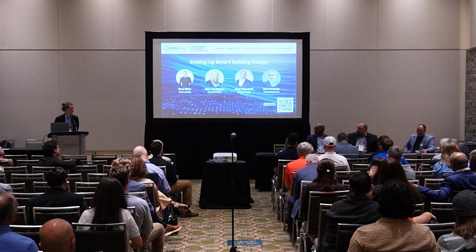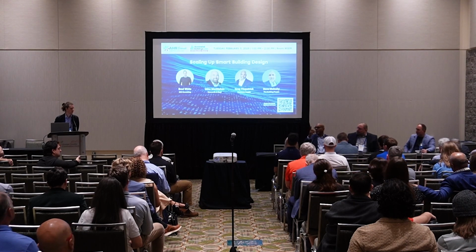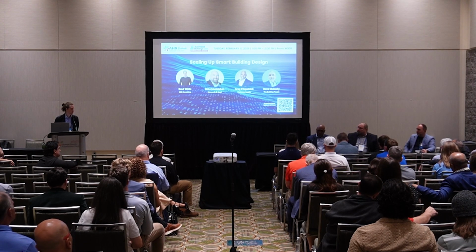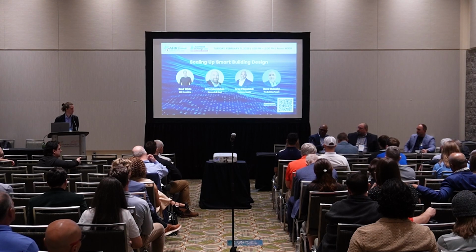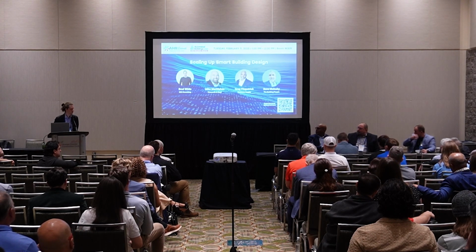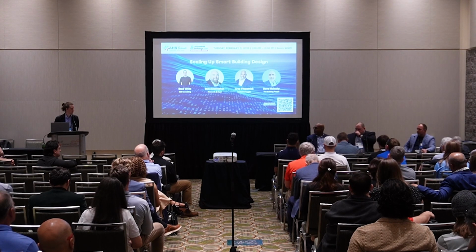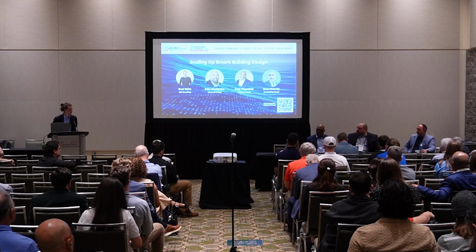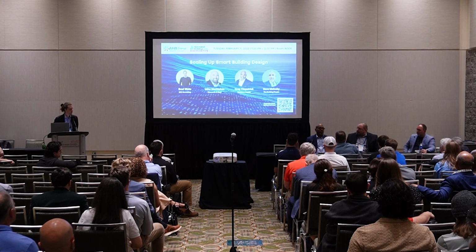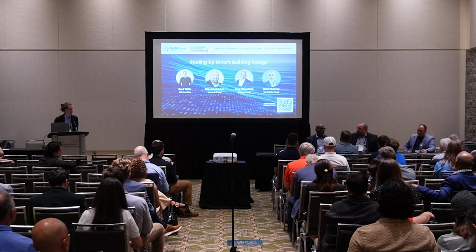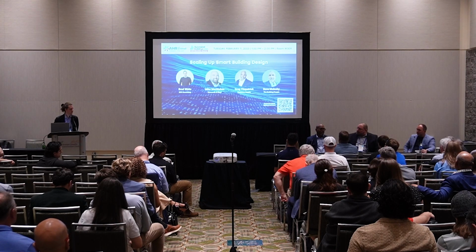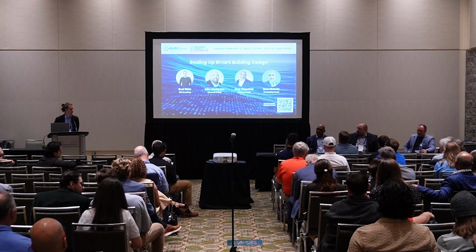As a commissioning agent, your job isn't to go and count duct hangers and slow the process down. Your job is to make sure that the job is installed as per contract documents, but in an efficient way, to make sure the owner gets exactly what he thought he paid for. And the challenge in that sometimes is the level of detail that's put in the construction documents. If your construction documents are weak, then you don't have much of a hammer as a commissioning agent.